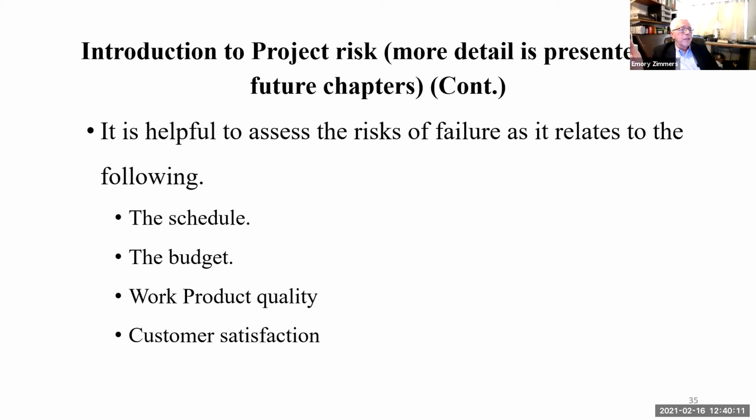What could happen with the budget? You could run out of money, because of, say, unanticipated cost increases. Mm-hmm. If the project manager reported back to the New York financer people that were financing that, well, sorry, I ran out of money, I think they'd want him to be a little more specific. What are the risks that you could have encountered, should have planned for with this? There's a risk of increase in the cost of certain commodities, certain items, and you can try to mitigate that risk also by building in contingencies, and we'll look at that.